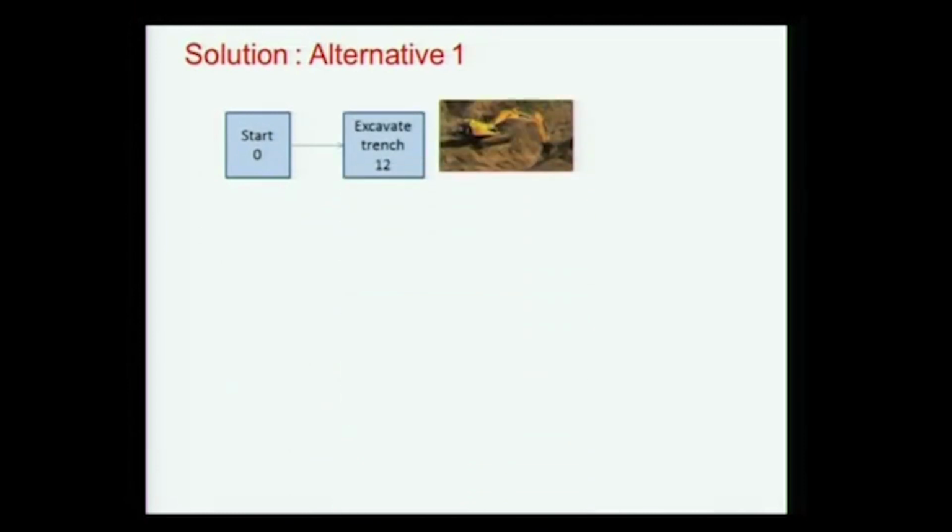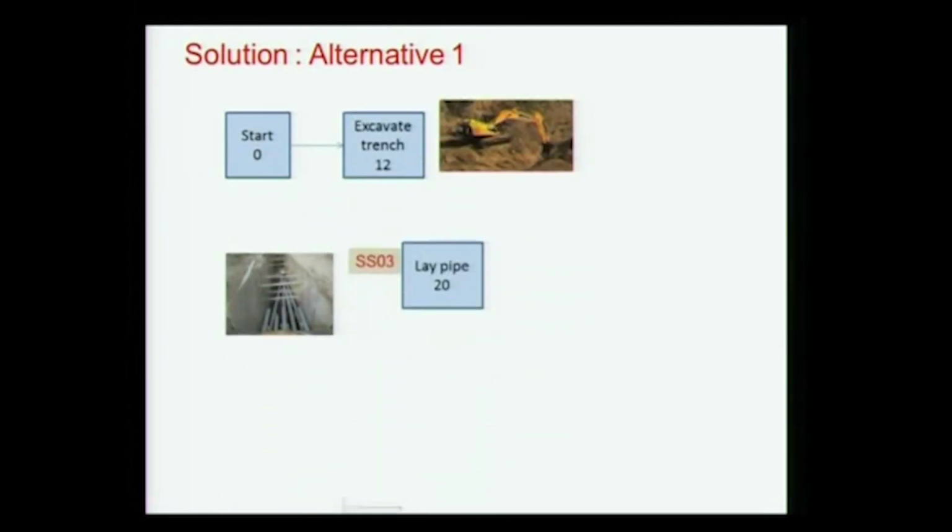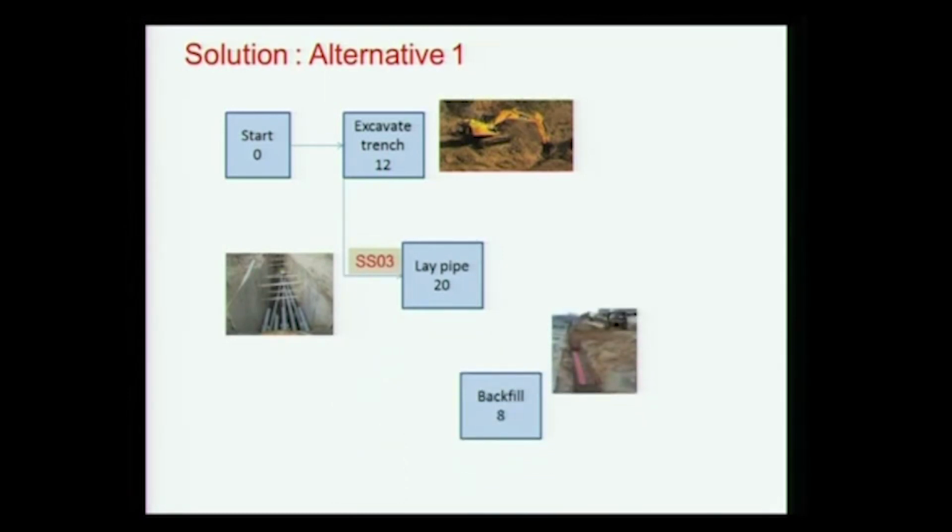Okay, so let us look at alternative 1. We will say excavate, we will have a start to start, lay pipe, and backfill. Now this is a very common representation people make, because they look at the start parts of it and the finish.